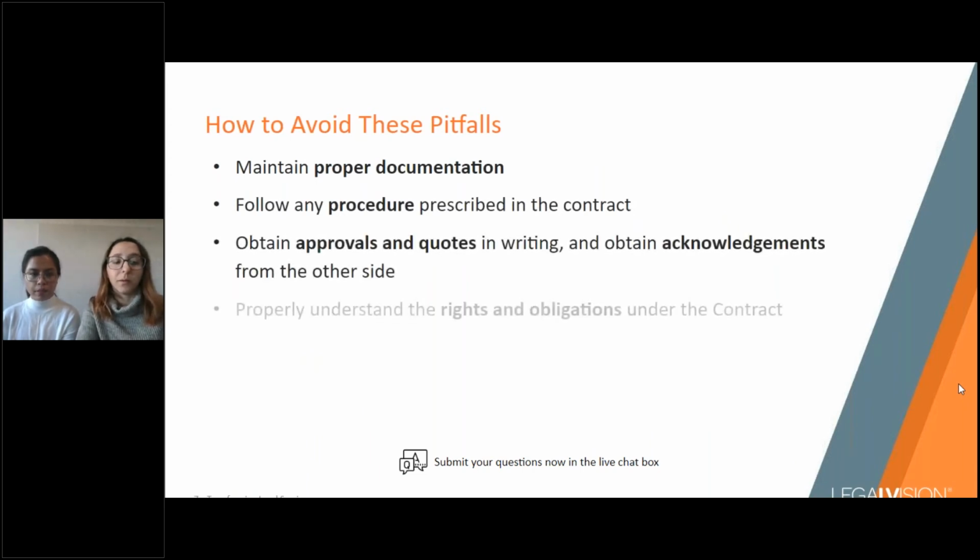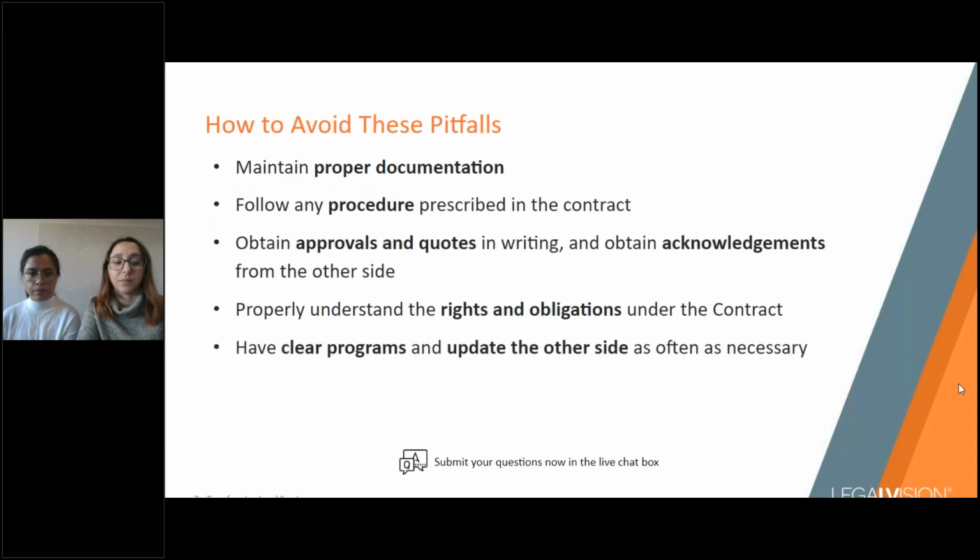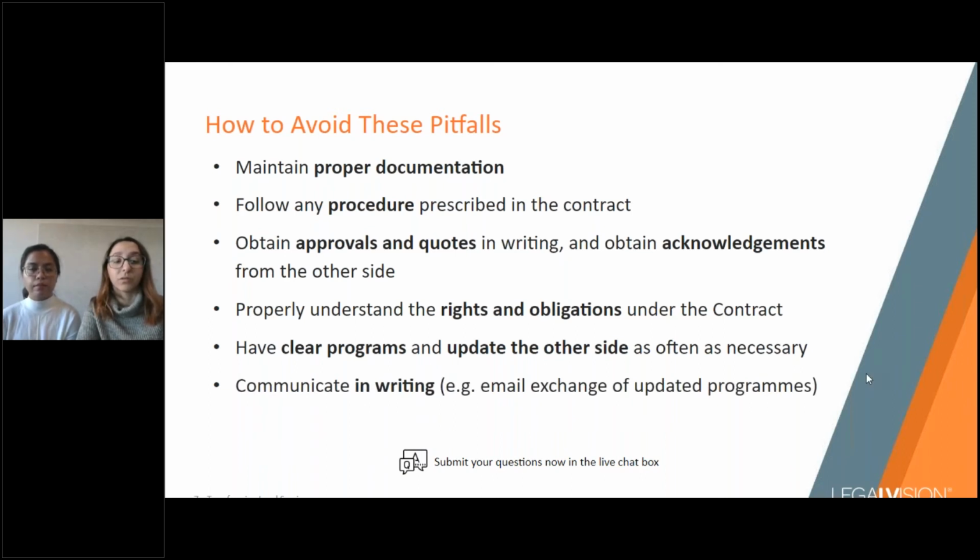So one point is to maintain proper documentation. And this is a point that comes up time and time again in all disputes, but very much so in construction disputes of any size. We can't stress enough the importance of ensuring that you have a written record of all of your dealings, and that includes those with your customers, subcontractors, or even superintendents. These sort of written records could include confirming your in-person or telephone discussions via email shortly after they occur, especially if there's some agreement reached on a particular issue.